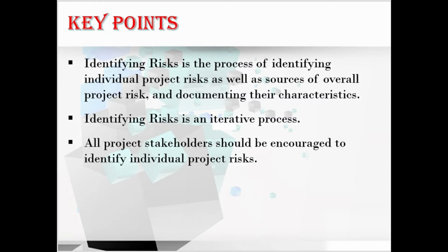The participants in the risk identification activities may include the project manager, the project team members, the project risk specialist, if any is assigned, customers, SMEs inside or outside of the organization, end users, other project managers or operation managers, and stakeholders. So these people are all included in the risk identification activities, and it is an iterative process. Hope you understood this. So we have understood its definition, the key benefit of this process, and some important points on the Identify Risks process. Let's move to its ITTOs.